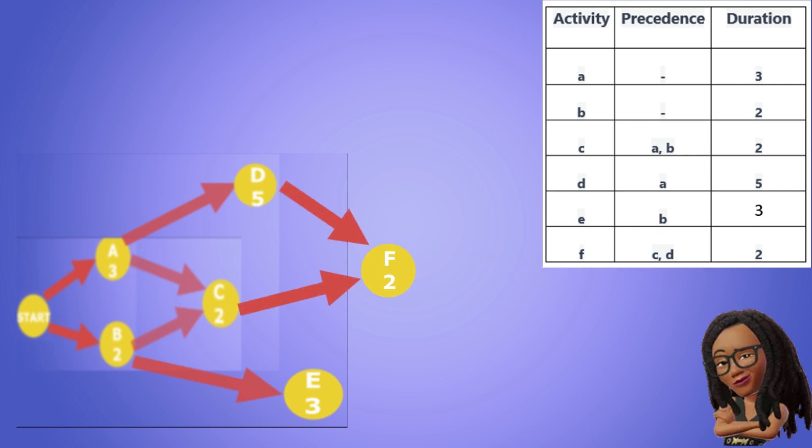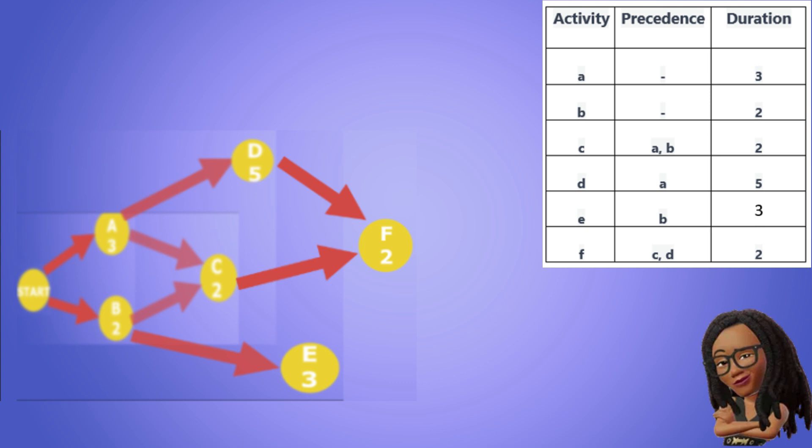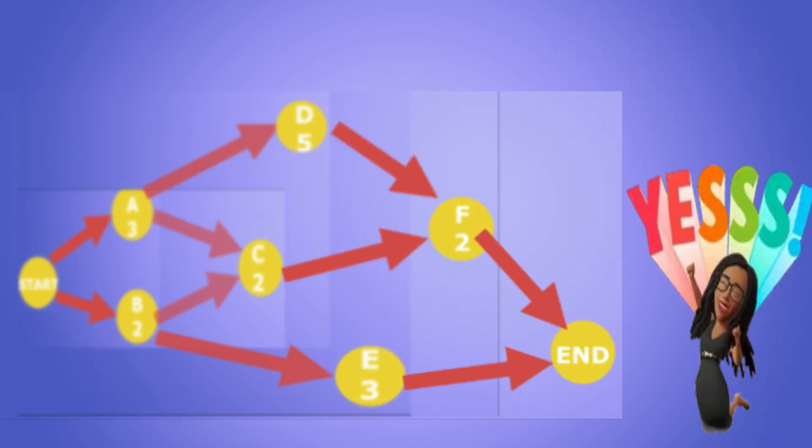Since there are no more activities, we can create an end node to represent the finish of the project. We connect F and E to the end node since neither has any successor activities. And there, step one is complete. We have drawn our activity on node diagram to represent our project.